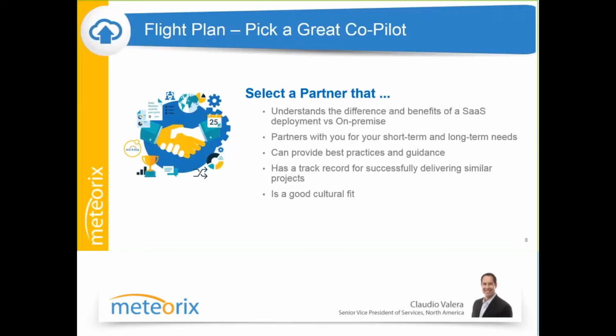It's much more iterative in nature, and it's very powerful in the sense that it gives you the opportunity to experience the system earlier in the implementation, and as a result, continue to test and adjust that solution till you get it refined and ready for production and rollout, versus a very traditional on-premise methodology or waterfall type project plan that may be, for example, 12 to 14 months in duration, may have customizations associated with it. That type of project is not your Workday SaaS deployment project.